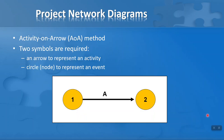To draw a project network diagram, we'll use the activity-on-arrow method, AOA for short. Only two symbols are required: an arrow to represent an activity — which is why we call it the activity-on-arrow method — and a circle, or node, to represent an event. There are two types of events: node number one represents the start of an activity, and node number two indicates the end of that activity. So there are only these two types of items needed to draw a project network diagram.